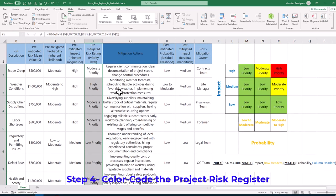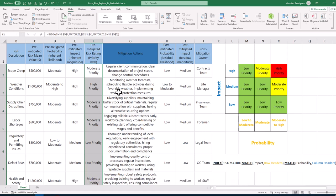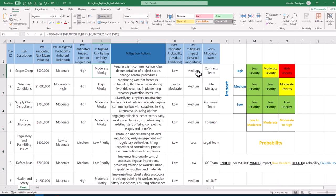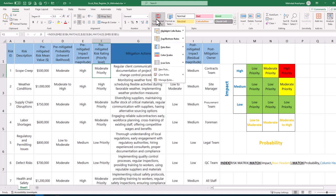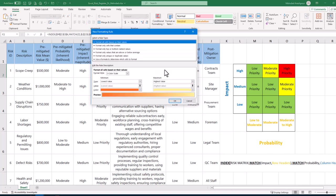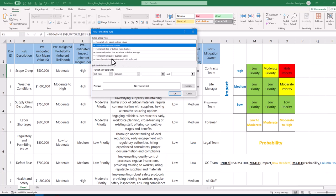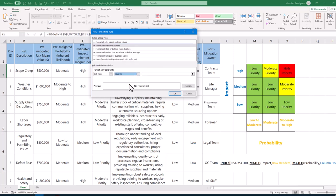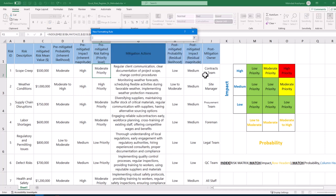Step 4 is to color code the project risk register. Now we can better visualize risk ratings in our dynamic risk register by using conditional formatting in Excel. First, click on the pre-mitigated risk rating for risk 1 and under home tab select conditional formatting. Then from the drop down menu select new rule and in the pop-up window set the rule type to format only cells that contain which is the second option.